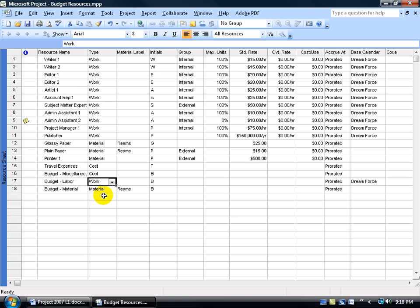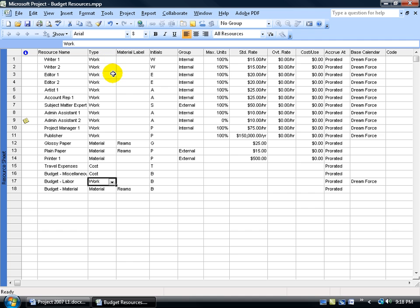For your work, you're going to be budgeting for how many man hours it's going to take to complete the project — you could say 500 man hours. As you start entering in man hours, you may have estimated 10 man hours for one task, but if the writer needs more hours, and collectively everybody's taking more time and it goes over 500 hours, again there's no red flag — it's just for you to compare your 500 versus what's actually being worked on.